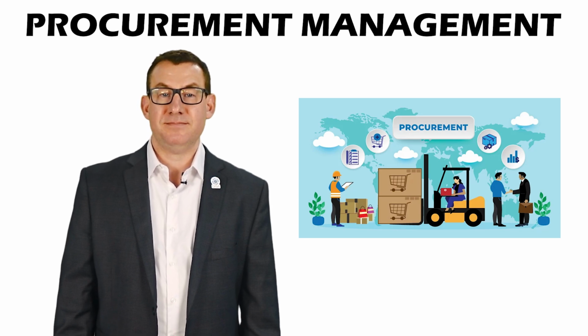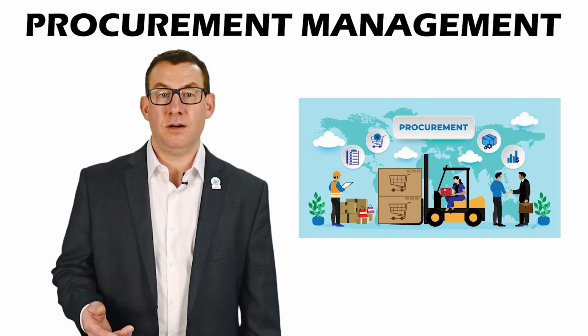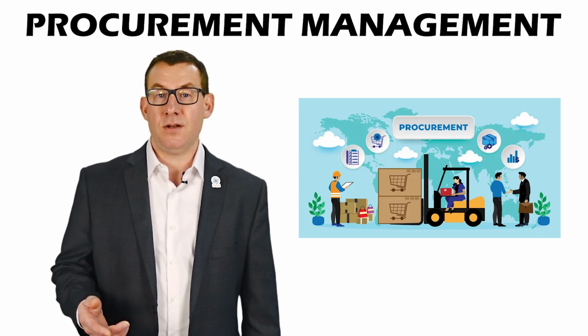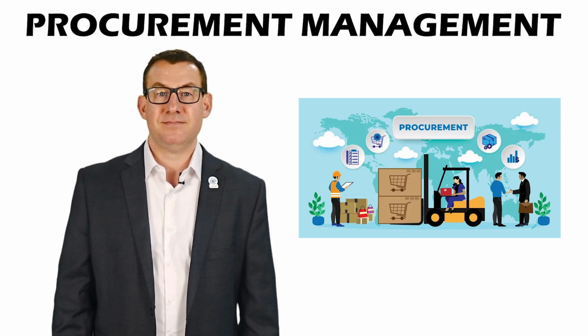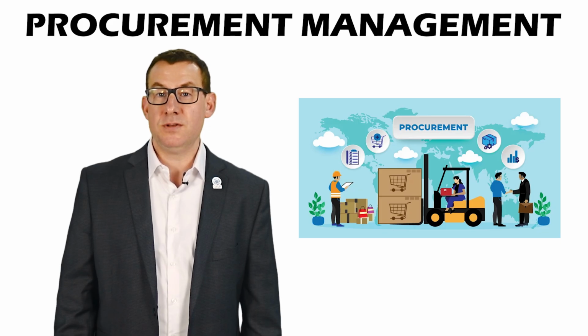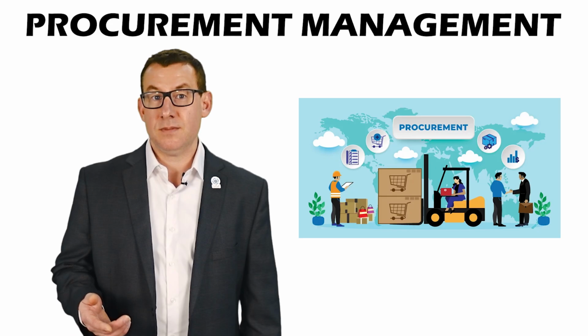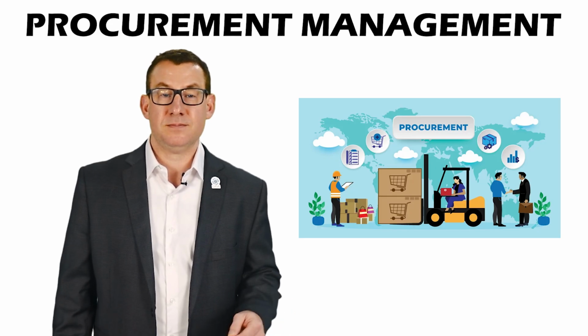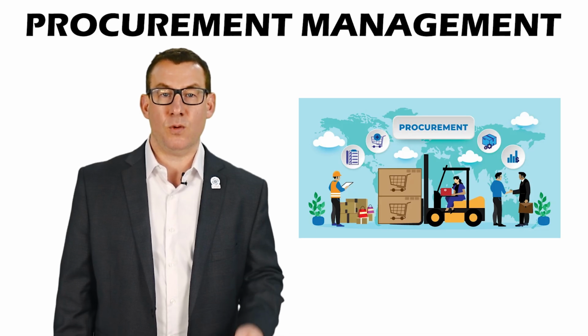Procurement management. Procurement covers acquiring software, hardware, consulting, imagery, or data services. GIS projects may use RFPs, RFQs, bids, or sole source contracts, and must manage contract scope, deliverables, and performance.